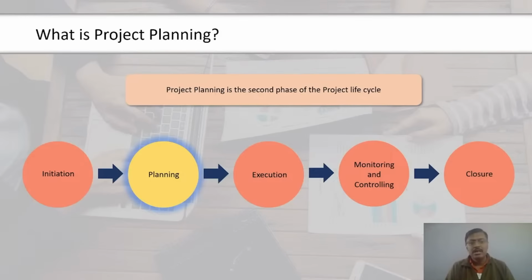Some activities may happen in parallel, some happen in sequence. For example, if I take a wall in a construction project, after doing the plastering of the wall only, I can do the curing. I cannot do the wall finishing as well as curing of the same wall at the same time. It cannot be in parallel.